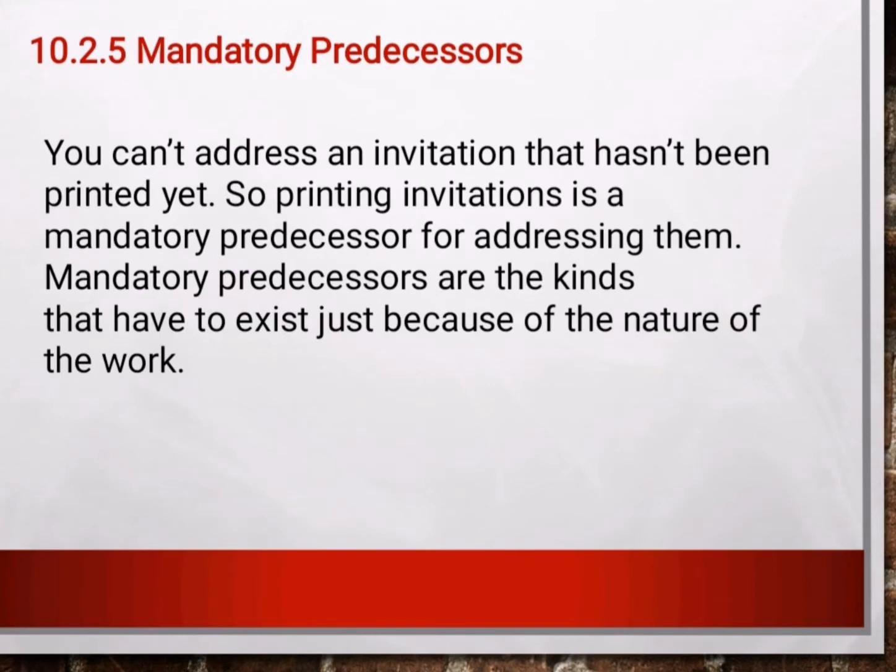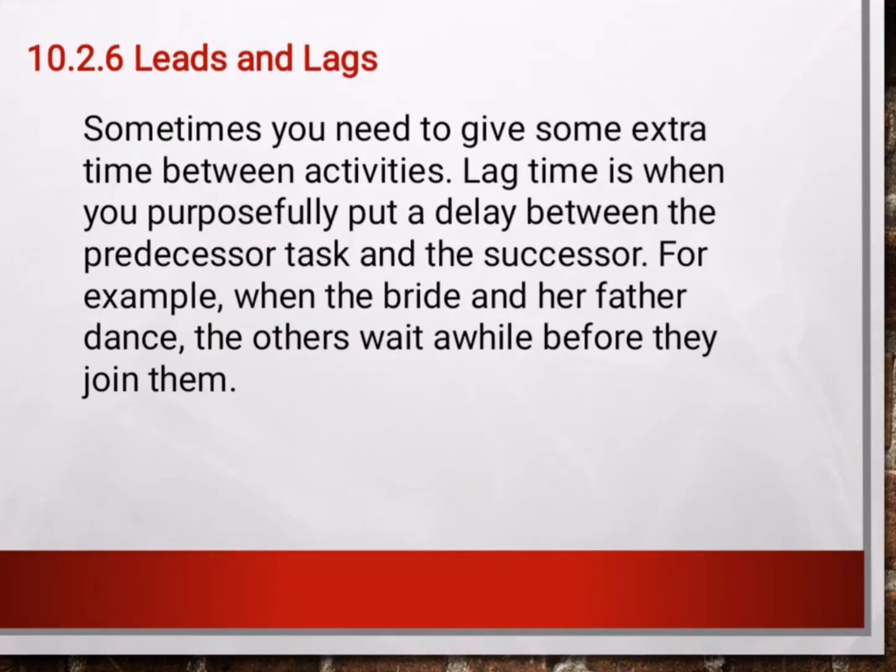When we say mandatory predecessors, it refers to a relationship that is inherent in the nature of work. This means that the tasks are contractually required, therefore no other task should be implemented until the needs of the mandatory tasks are satisfied. So let us proceed to the leads and lags.